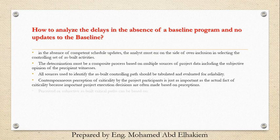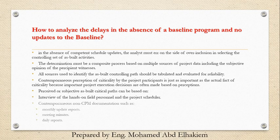Perceived or subjective as-built critical paths can be based on interviews of the hands-on field personnel and the project scheduler, contemporaneous non-CPM documentation such as monthly update reports, meeting minutes, and daily reports.